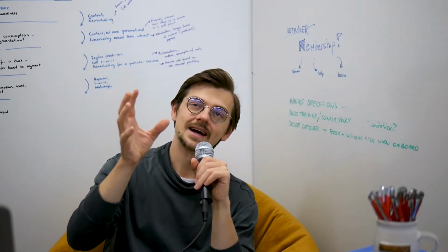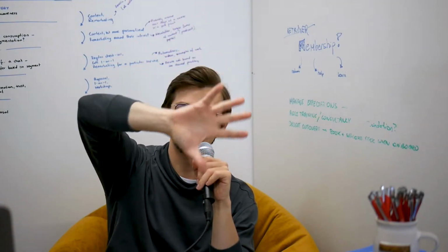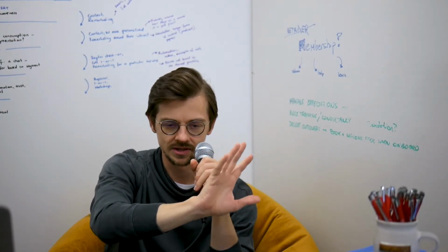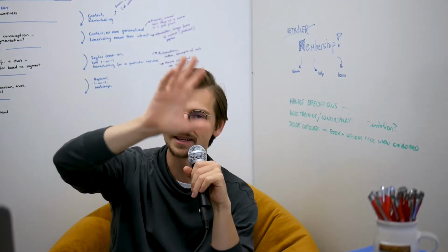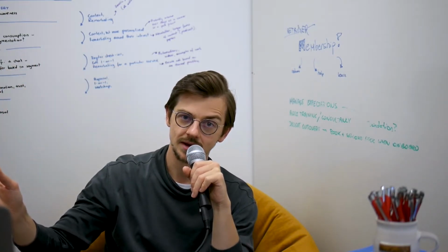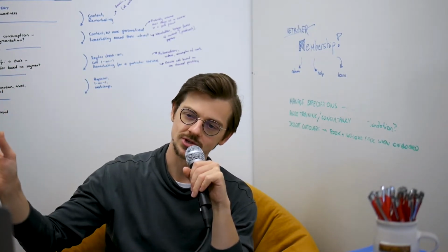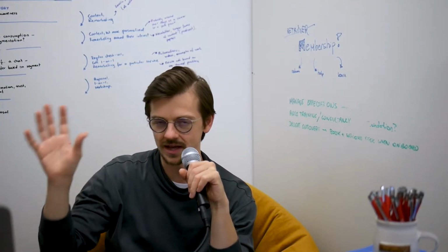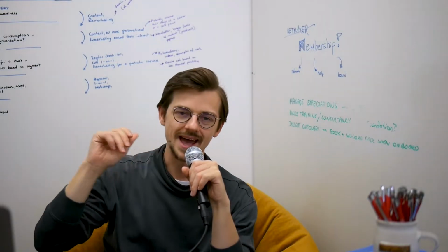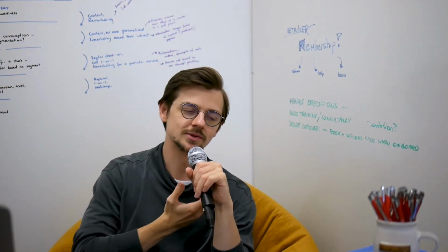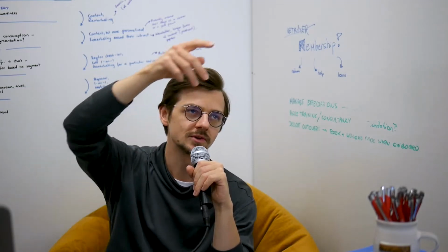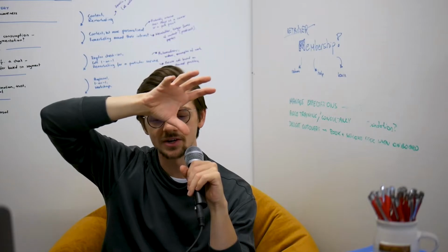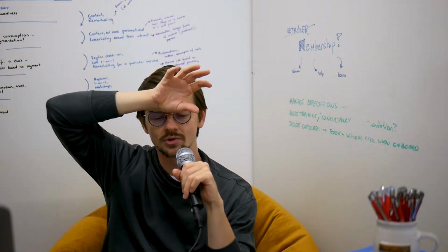Design tax is when the designer spends all their time listening to clients' requirements, doing research, reading the technical scope of the project, designing something. It goes to development, and then the developer raises tons of questions because designs are not complete. They don't include all the states of the button. They don't account for edge scenarios, and the developer has to go back to the designer. They go back to square one. They have to go back to the client for approval, and it just goes on. And that designer is effectively doing the same work twice.